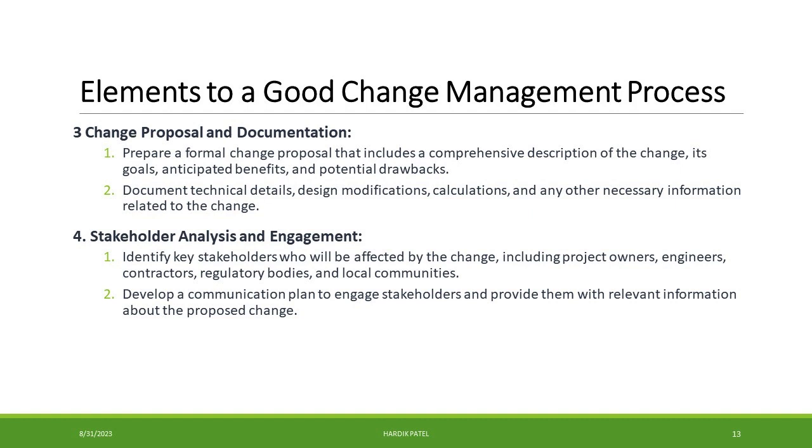Thus, identify key stakeholders who will be affected by the change, including project owners, engineers, contractors, regulatory bodies, and local communities. Develop a communication plan to engage stakeholders and provide them with relevant information about the proposed change.